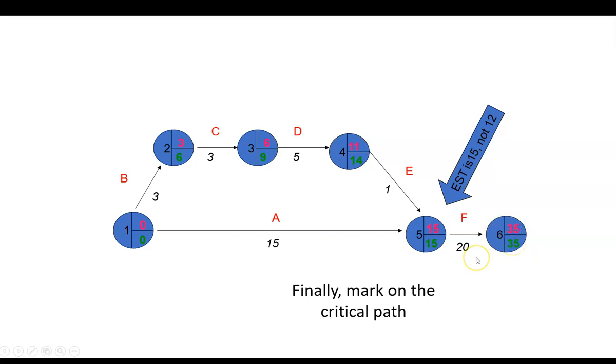So here we can see, it's going to work forwards, we can see here to here the same estimated start and finish, here to here same start and finish. But we can see here, we think we will start at 11 weeks in, but we don't have to have completed this until 14.